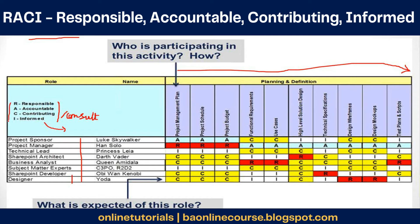Roles are generally classified into one of these four. For example, if you are a business analyst, you would be held responsible for functional requirements — you have to make sure that the requirements and use cases are captured. You are also responsible for preparing the test plans and scripts. For the rest of the activities, like planning, scheduling, budgeting, design, and markup screens, you are contributing — providing advice where needed, informing the team if something can be done better. This RACA matrix is generally prepared at the start of the project.